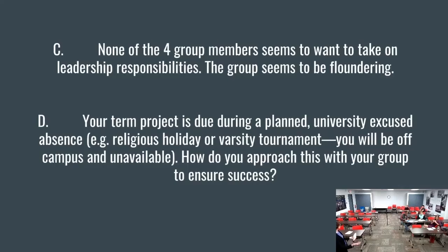Yeah, so this is another case where you need an intervention, where someone steps in and starts the plan. And I will say with the leadership role in particular, but all of the group roles that have to happen, it's often beneficial to rotate them throughout the course of a longer process. If you have to be the person in this group of four who steps up and says, okay, I'm gonna get us on track, I'm gonna make a plan, it's also okay to say, and I'm gonna do it for 2 weeks, and then the next person is gonna take over. That shares the responsibility of leadership and organization. So it doesn't have to be whoever ends up cracking first and stepping up for the leadership role.